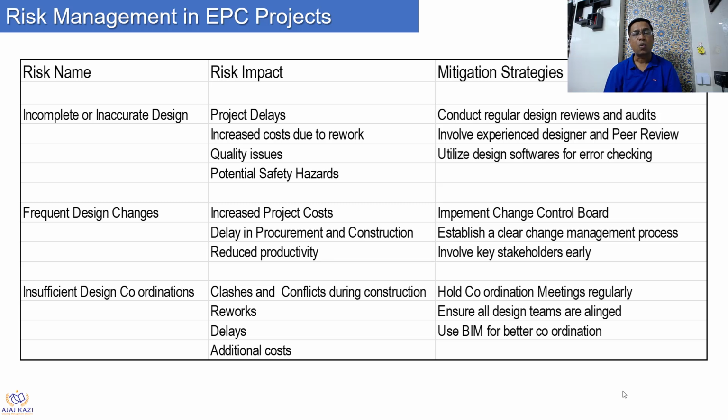How do we handle this? Hold coordination meetings with all the stakeholders. When I talk about MEP, if there are 4 or 5 MEP contractors, get them together and hold that coordination meeting. Otherwise, the item which is supposed to be installed first, the second will go and install it. The first misses it, the second has to remove it, then he has to go up. A lot of confusion, a lot of clashes, a lot of disputes.